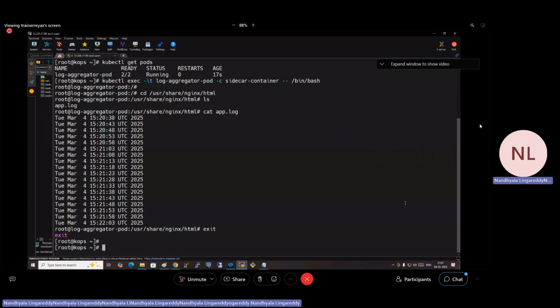All these things we need to do. And so we'll go and submit this proposal to the customer. The customer will see this proposal. If they say okay, then we start drafting something called the SOW. What's that? Scope of work.